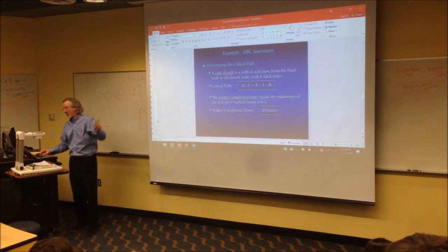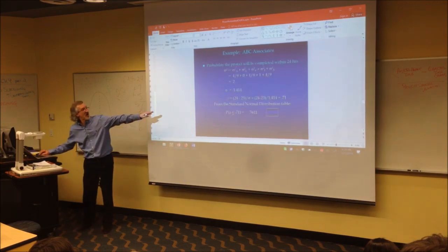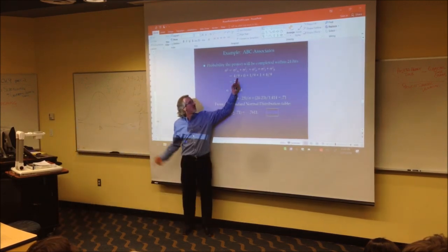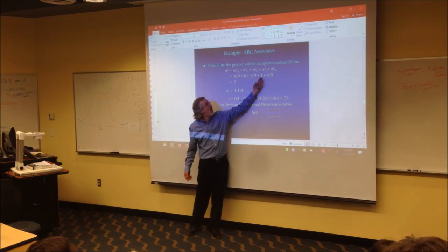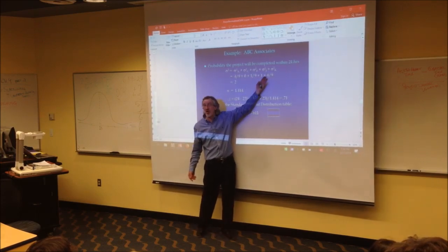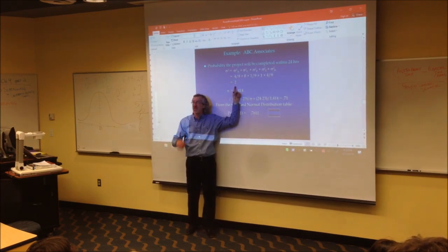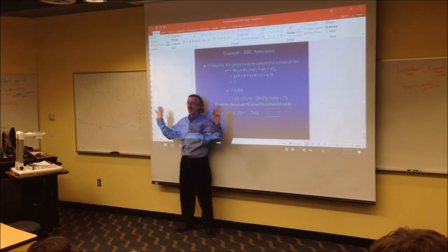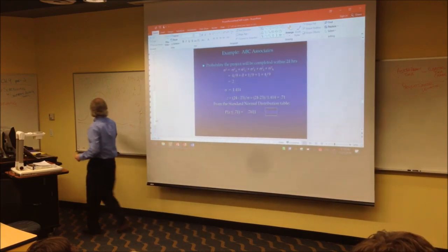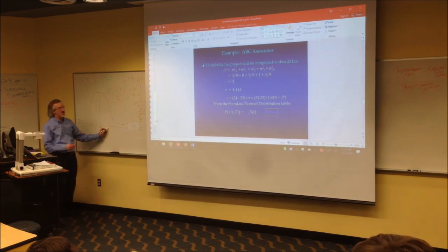Are you ready? So we're adding up the variances of those 5 activities. Here they are. 4/9, which is 0.444. 0 is the other one. 1/9, which is 0.111. We got a 1 here, big variance. 0.444. You add these up. The project variance is 2 units of time, square rooted. The project standard deviation is 1.414. That's the number we needed. That's the number that will now tell us what this dash is right here on this number line.